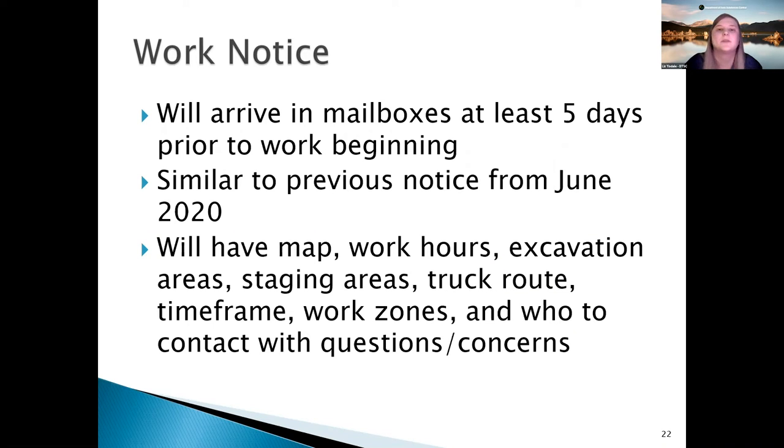So, work notices. Prior to this work beginning, you'll receive a work notice in your mailbox at least 5 days prior to that work beginning. This will be very similar to the notice we sent out in June of 2020 for our supplemental site investigation work. That'll have the map, work hours, excavation areas, everything you would want to know about what's going to be happening at the site. And it'll also have who to contact and their contact information with any concerns or questions you may have about the cleanup as it's occurring. Slide, please.